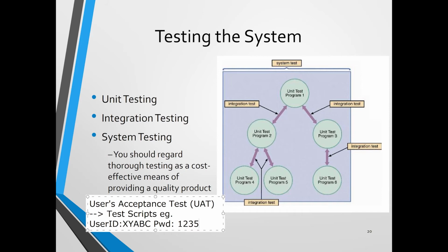After that, you may say, re-enter the user ID and password again. And right now, it might be the correct one, so you may ask them, what do you see? So you may have a table to let the users type in that this one leads me to the main menu. And you may ask them to capture the main menu screen onto this script. After that, in details, what else? If you say that this is the test script for the sales representative, the things that the sales representative has to test is that, firstly, log in.